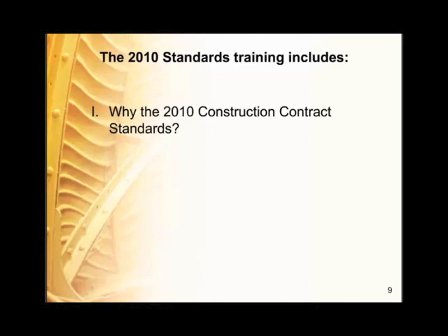Included in this presentation will be that any item of work shown, including any costs associated with the permits, licenses, and certifications of each project, but not provided with a bid item on the bid itself, are incidental to other items listed of work and included in the total bid.